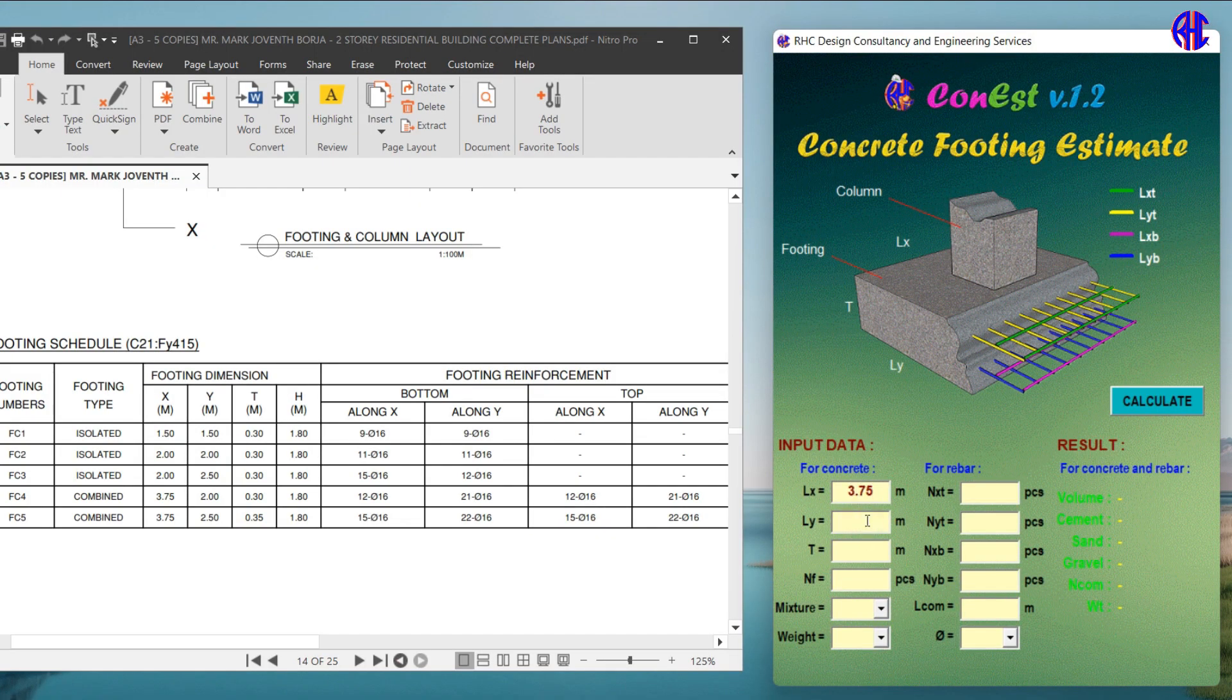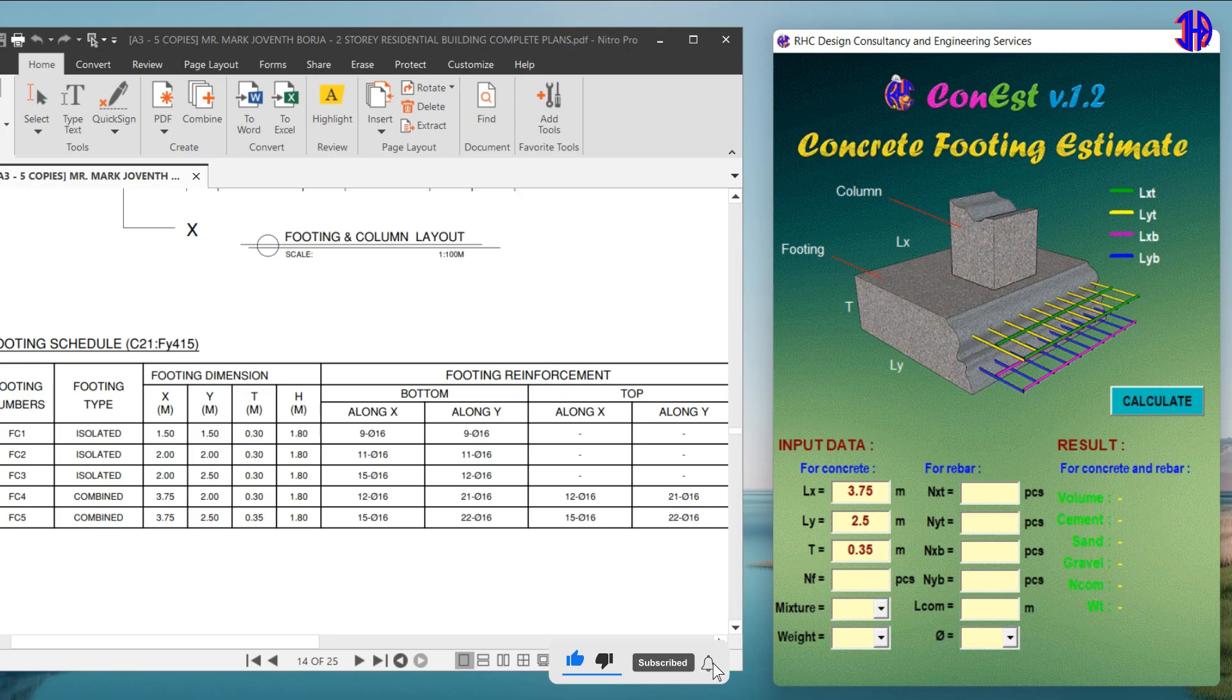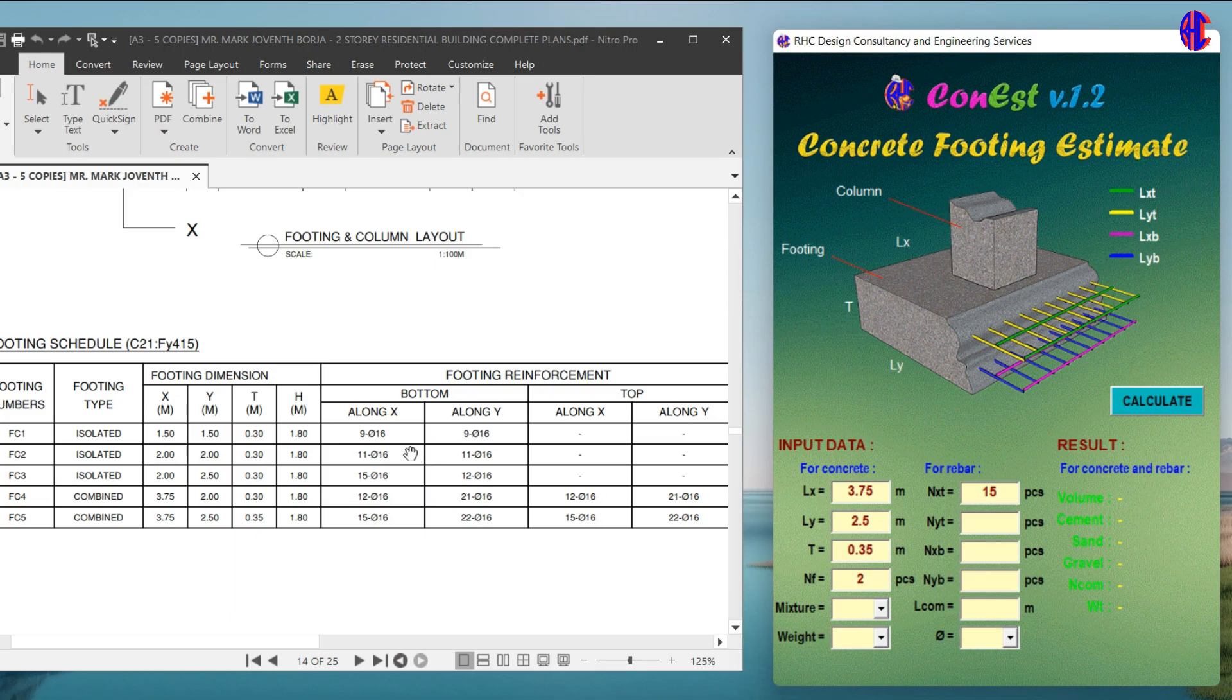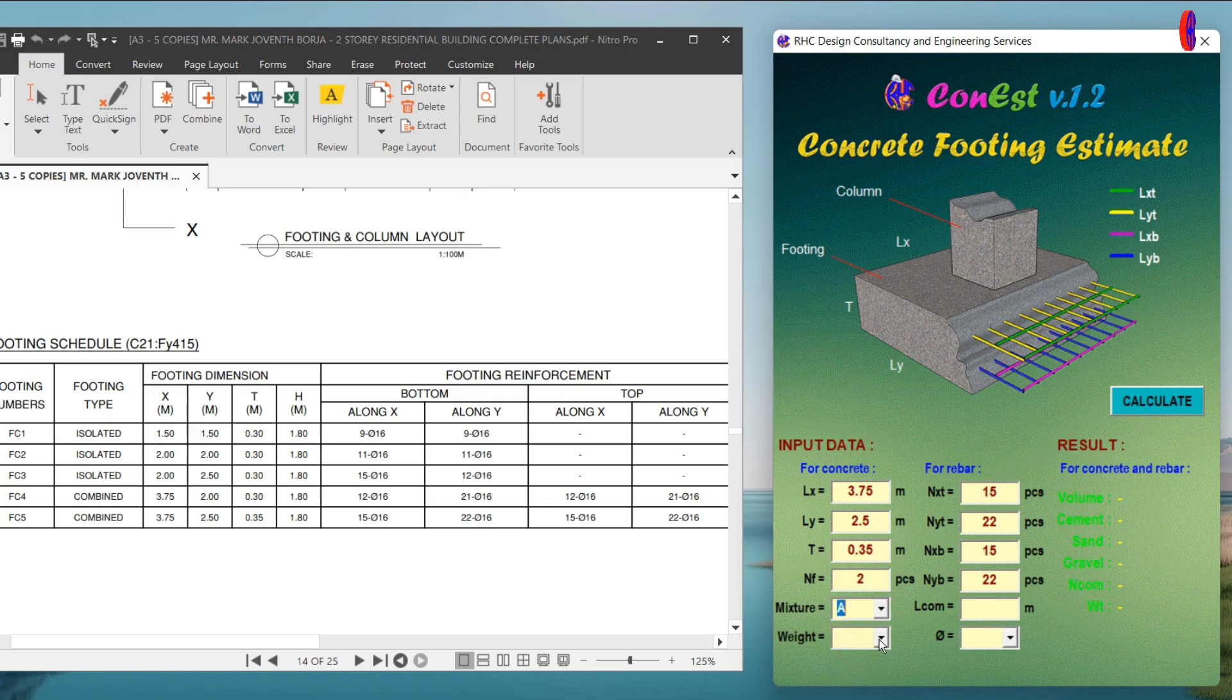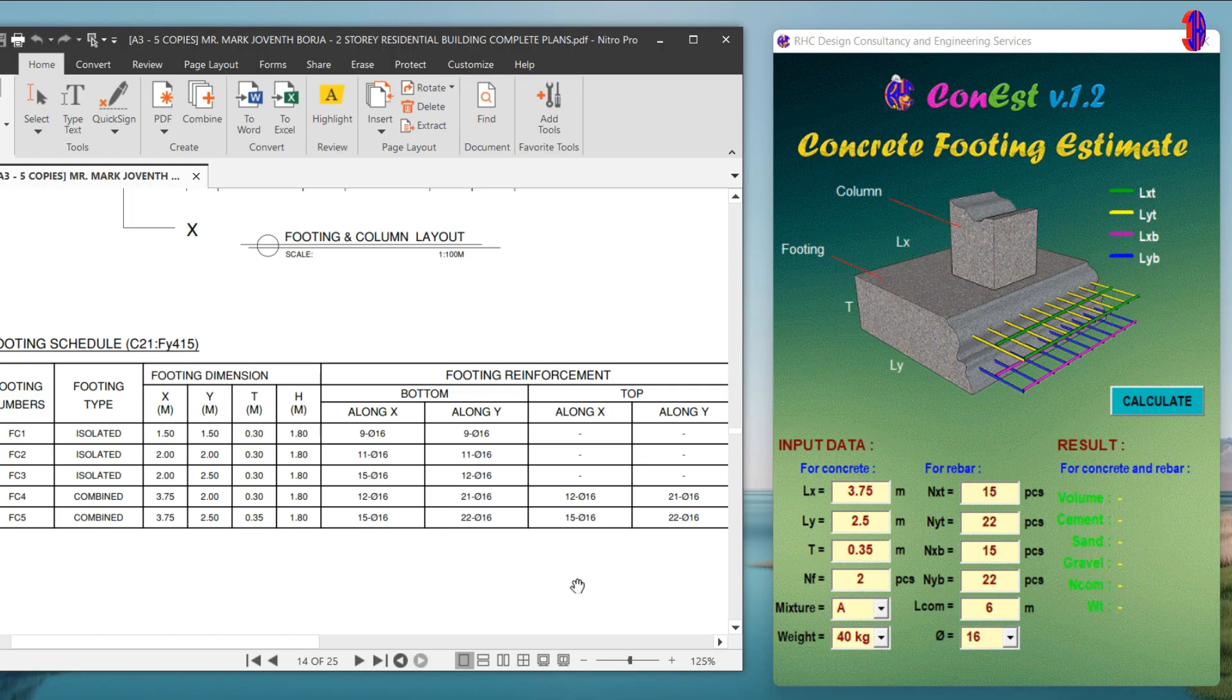Let's use the data of FC5: Lx equals 3.75 meters, Ly equals 2.5 meters, T equals 0.35 meters, Nf equals 2 pieces. For the top reinforcing bars, NxT equals 15 pieces, NyT equals 22 pieces. For the bottom reinforcing bars, NxB equals 22 pieces. For the concrete mixture, let's use Class A. For the cement weight, let's use 40 kilogram cement per bag. For the L com, let's use 6 meters. Lastly, let's use 16 millimeter reinforcing bars diameter as per the schedule.